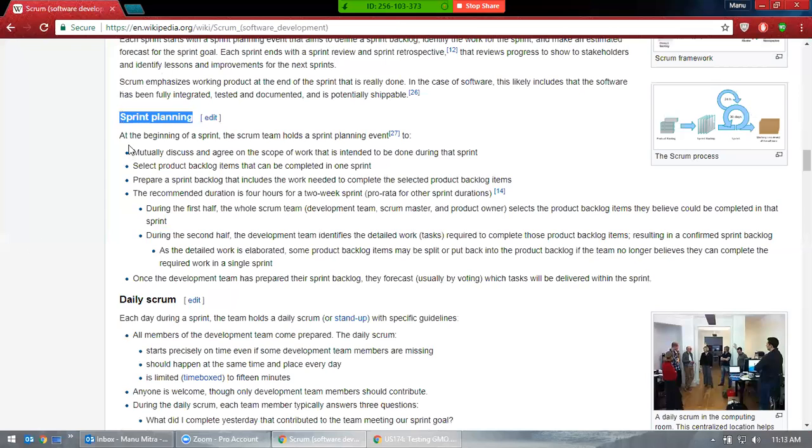Okay, so what you have to do in every first week of sprint, every first week of month, you have this sprint planning session. That means you want to see which user story is going to which sprint. So that means you want to see which priority of the user stories. There will be a priority of user stories, right? And which has to go in. Sometimes user stories which are not priority goes next sprint.